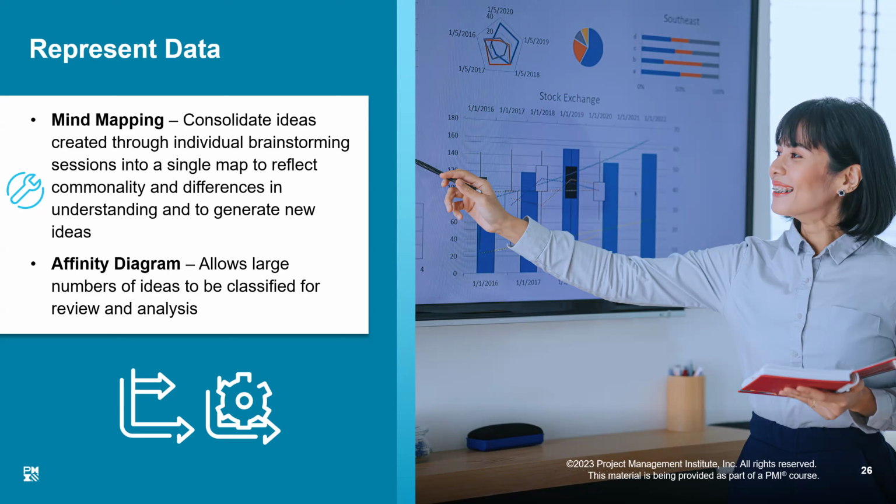That means, just like mind mapping, we come up with a main idea and then we discuss this idea could be broken down to these areas, and then we classify all the ideas into those boxes, right? Just like, okay, these are the product related ideas here. These are the different ones. So we can put them into separate boxes, just like we did the Moscow analysis or Kano model. So basically, we are trying to classify the various ideas into various categories. That is called the affinity diagram.